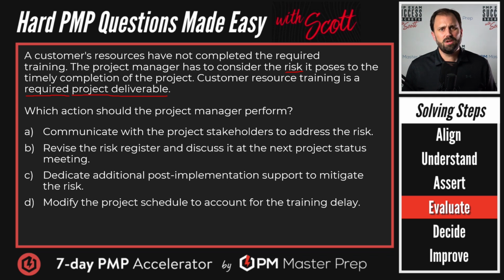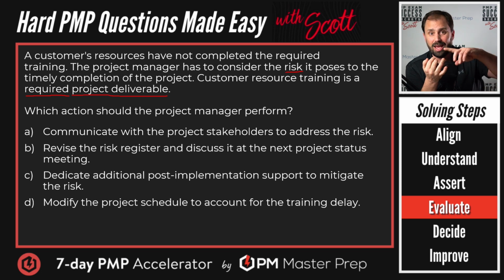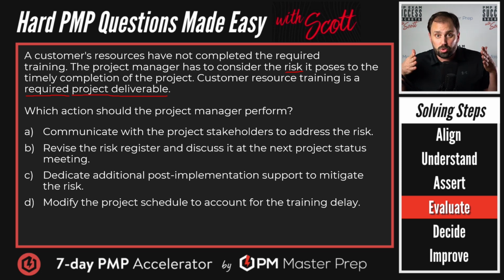Tell me. Well, the thing that I don't like about it is that additional post-implementation support. Now, we've already established that this is a required deliverable, right? We've already established a process to go about doing this. There's probably money, labor, time established against it. We're saying we're going to add more in there, and we're just going to go ahead and do it. Just throw more money into an existing thing. Can we do that? Should we do that? In the waterfall world, no. We want to go through the change control process if we're going to do this. So on that level, I don't like it. And it hasn't helped us understand what the issue is, hasn't helped us work with the customer and the stakeholders to deal with it. And it hasn't really put forth an effort that goes through the initial plan.